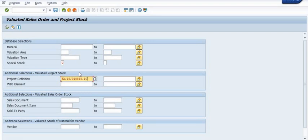Today we learned how to close the open project using CZ02 directly from the project definition when everything is finished. In our case, 27 units of quantity were pending for consumption in the WBS, which is why the system was giving an error. In the second case, we successfully reversed the 415 MIGO document and closed the project and each WBS element.